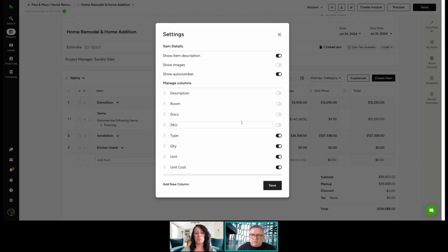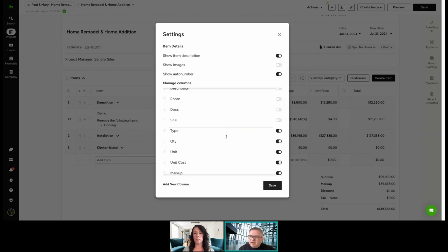You'd rather get a call from a client that says, hey guys, I have a question about item 3.5. It's much easier to go down the list and find 3.5 than if they call and say, hey, what's a skip bin? Now you're having to go through the list to find that item and explain it to them. And in this section here, one of the things I do recommend is type, quantity, unit cost, markup, and unit price. So these 6 I recommend being turned on.